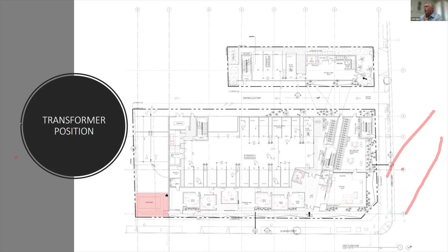The maintenance requirements and access requirements can actually require that you end up having vehicular access associated to curb cuts, truck access, and it's potentially larger than the actual transformer space itself. So it can typically be offsite, as in the past. However, recently in Los Angeles, they've been asking for it to be onsite. But as of, I believe, three months ago, they are providing a waiver for affordable housing to allow them to have the maintenance area outside the property line again.